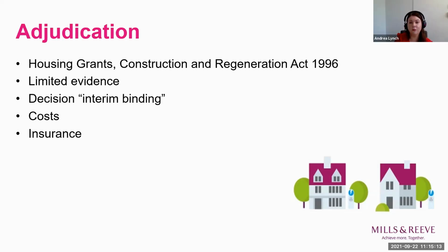Thanks. So clearly it's a really speedy process. So the key question is, what if you don't like the outcome? Yeah, you're almost stuck with it. An adjudicator's award is known as interim binding. That means it's binding unless it's challenged in subsequent proceedings, so whether via courts or arbitration.